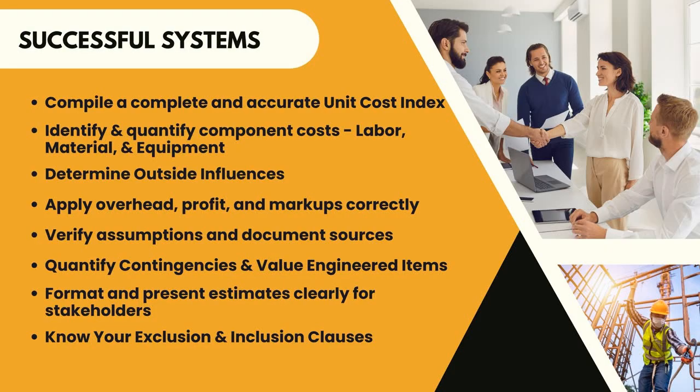We're going to apply those add ons for overhead, profit, and markup correctly, and verify assumptions and document any sources that we have. Remember, the more complete your documents are, the more accurate your bid is going to be able to be. We're going to quantify contingencies, and we're going to identify value engineered items. Format and present estimates clearly for your stakeholders, and know your exclusion and inclusion clauses.